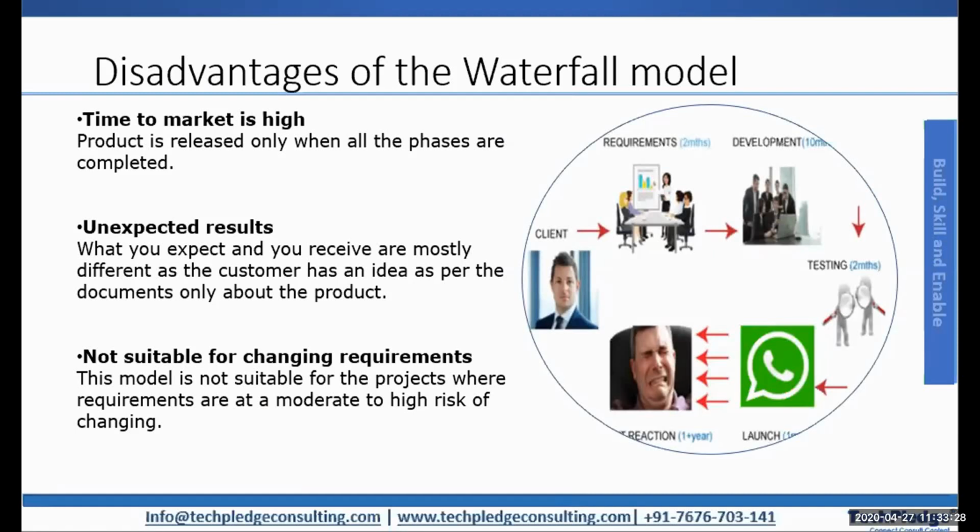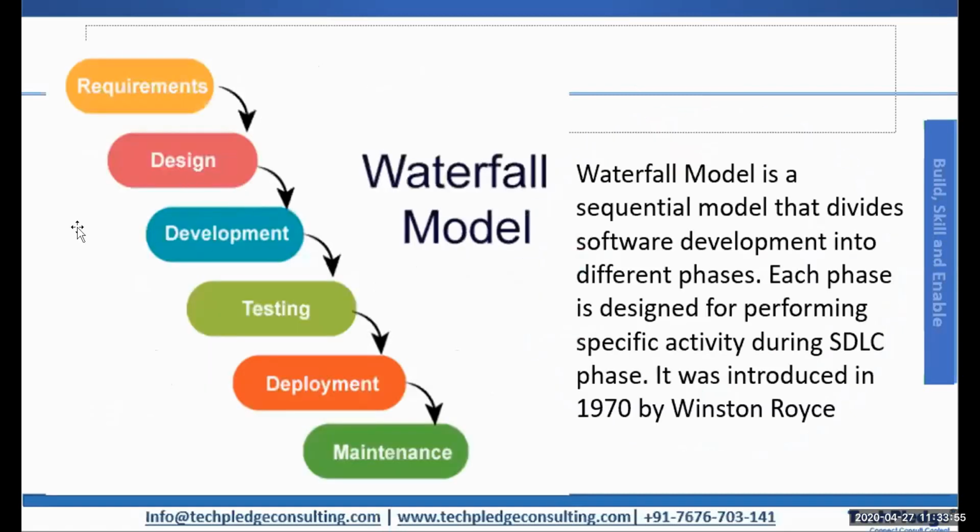First of all, because we are taking the entire project as one task, it is challenging: by the time it reaches the last stage of deployment and we get the feedback, imagine you need to change something and you have to go back to the development phase or the designing phase.